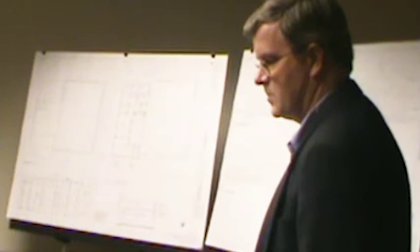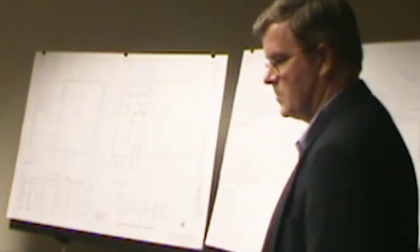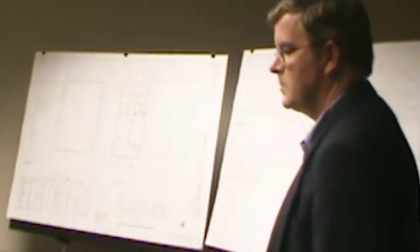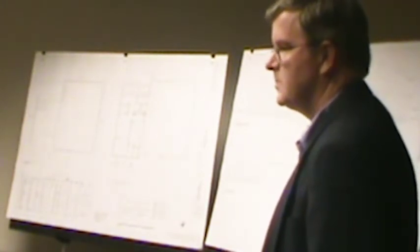I mean, we'll have to determine in terms of bidding timeline, making sure they don't overlap, because that could conflict and create issues with contractors that would hopefully bid and try to go after all three. Maybe they're choosing just one because of overlap. So we'll have to stage the bidding so they don't overlap, but that won't be hard to do.